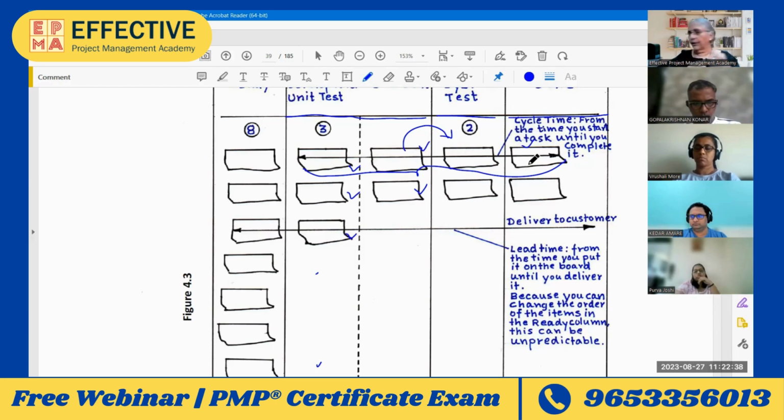Think of, sorry, a young team who just started working, very fresh, very enthusiastic. They know that they can do 8 stories in 15 days. They would want to pick up all the work and start. And what would happen in this case more often than not? Towards the end, you realize that they have delivered 2 stories, 6 stories they could not deliver. What does that mean? The cost is high and the value is low. You're not getting any results. Those 6 stories were not completed, will be back to the product backlog once again.